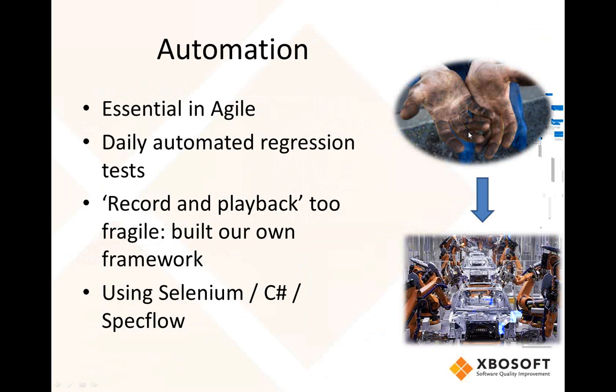While the poll is getting up, tell us a bit more on how you do this risk analysis, how you determine what to automate and what not. Well, I think the most important thing in a risk analysis is that you have to involve the different stakeholders. So we involve developers for the technical risk, we involve the testers themselves, the testing coordinators, but we also involve the project managers at the client, and we also involve the end client itself to determine the business risk.